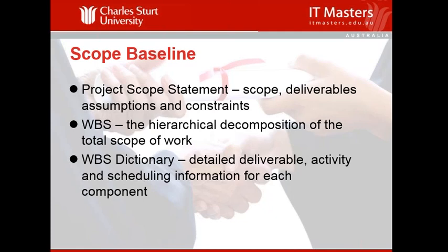Just to emphasize what the word baseline is, a baseline is a point in a value that's put in place at a particular moment in time. So essentially, when you've finished the initial planning of your project, you end up with baselines. You end up with a scope baseline, you end up with a cost baseline, you end up with a schedule baseline. All these things are measurements that you can monitor against and decide whether you are working towards your scope, you're exceeding, or you haven't quite met your scope requirements.